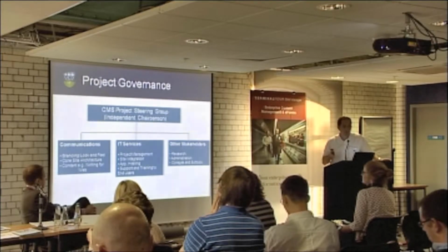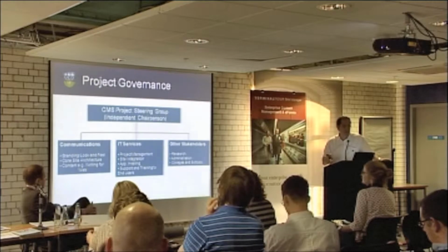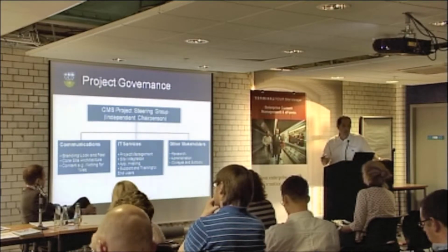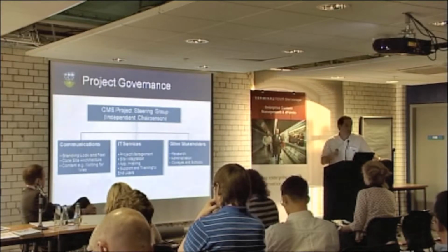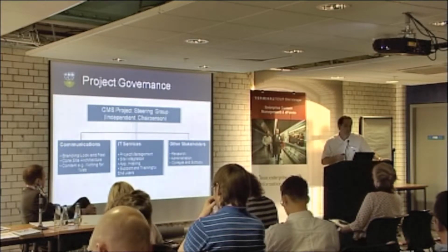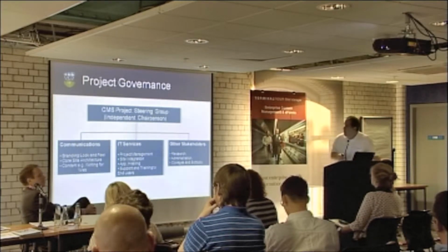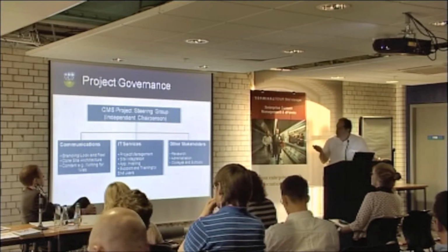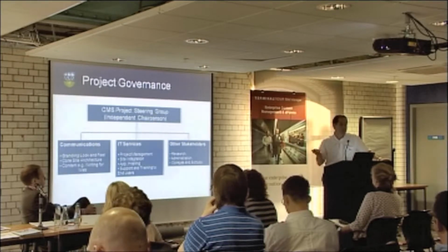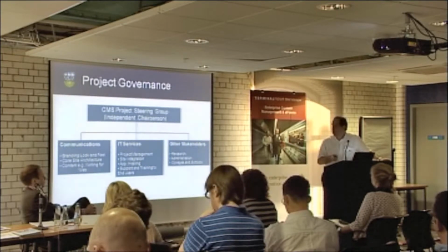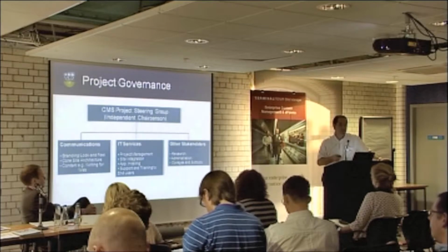At each stage of the project, we went back to the steering group. At each stage of the tender we went back, before we went to the pilot we went back to them, and then we went into production. At the early stages, we were meeting every 3 to 4 weeks. The steering group is still up and going, but it's broadened now to meeting every 3 or 4 months. The great thing about an independent steering group is that it's not perceived as myself or IT services making the decisions, and some of them can be, as you're all well familiar with, controversial or perceived as controversial across the university.